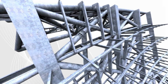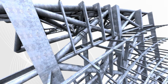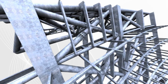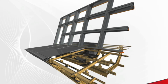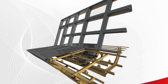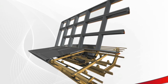In relation to the complicated roof, the 810 AJV, the Leighton Gammon JV, have appointed Alfasi, a steel fabricator, to do the steel detailing. So they've taken the geometry from the design stage, they've brought that to a steel detailing application, and they've actually put in connections, all the correct member sizes, etc., etc. The package for all the aluminium cladding and glazing has been awarded to Gardner. And Gardner also have to model everything in fine detail in 3D. Brackets, plates, angles, cladding rails, stiffeners, the whole shooting match is done in 3D.